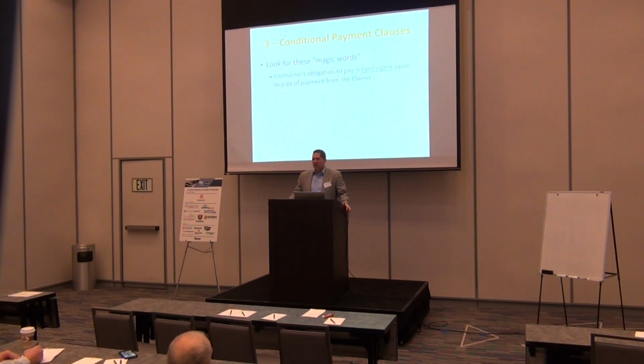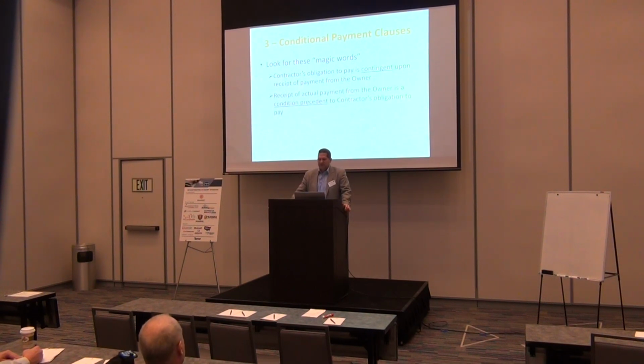So the magic words, and the cases talk about this, they say if it says that the contractor's obligation to pay is contingent, one of those fancy legal words, right? Contingent upon receipt of payment from the owner. So it uses a word like contingent. The other types of words that they use is that receipt of actual payment from the owner is a condition precedent, another great lawyer word, or two words, to the contractor's obligation to pay.